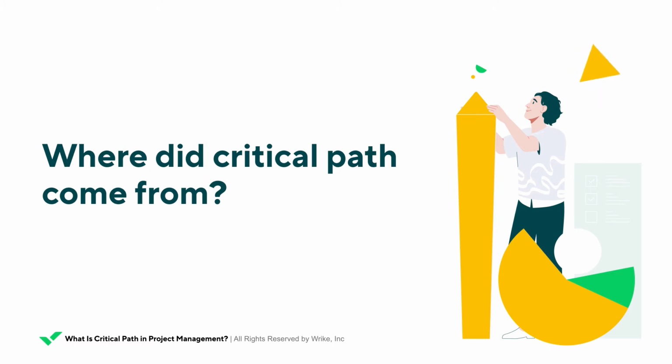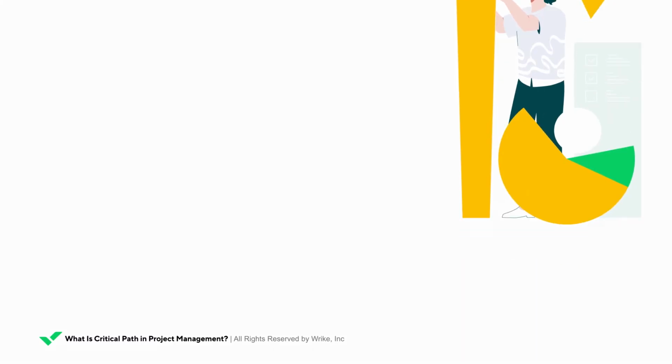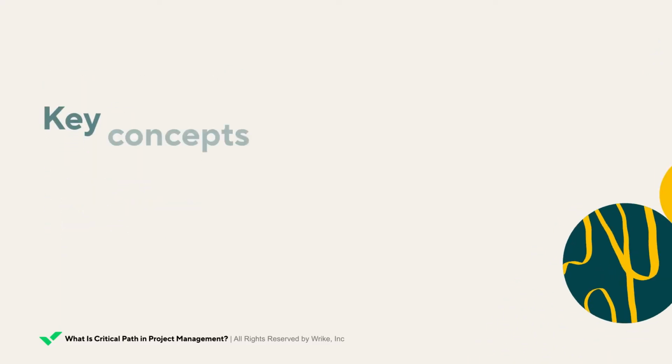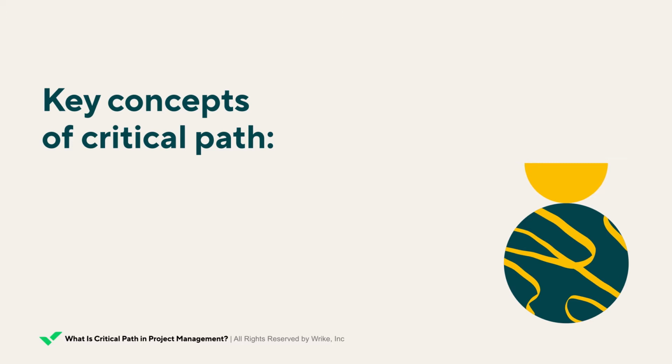So, what does a critical path in project management usually consist of? There are 3 elements you'll need to create a critical path in project management: a list of tasks needed to complete the project, any task dependencies, and the time that each will take to complete. Once you've found the longest stretch of dependent activities, you can measure them from start to finish to find your critical path.